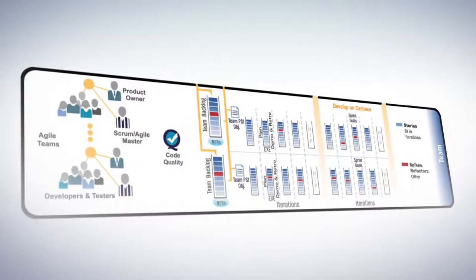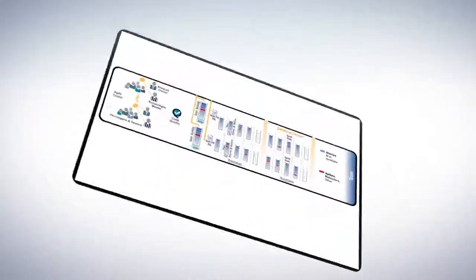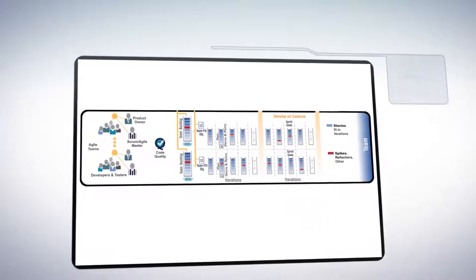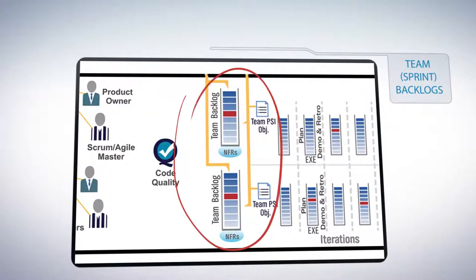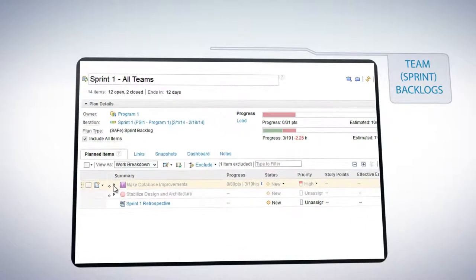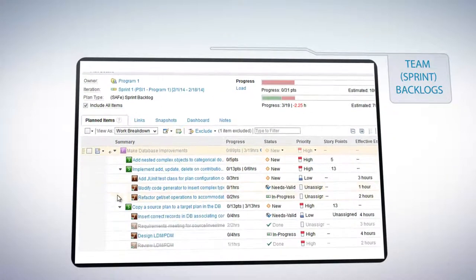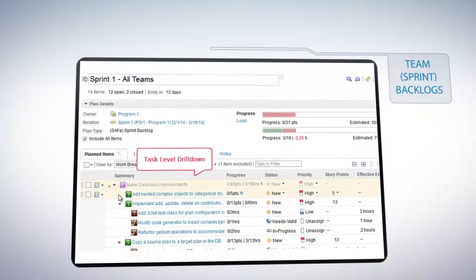At the team level, we find the primary fighting force for software development. Since it's an agile team, it has 5 to 9 members. The sprint backlog is the repository from which each agile team draws the tasks and activities needed to progress their share of the overall solution.